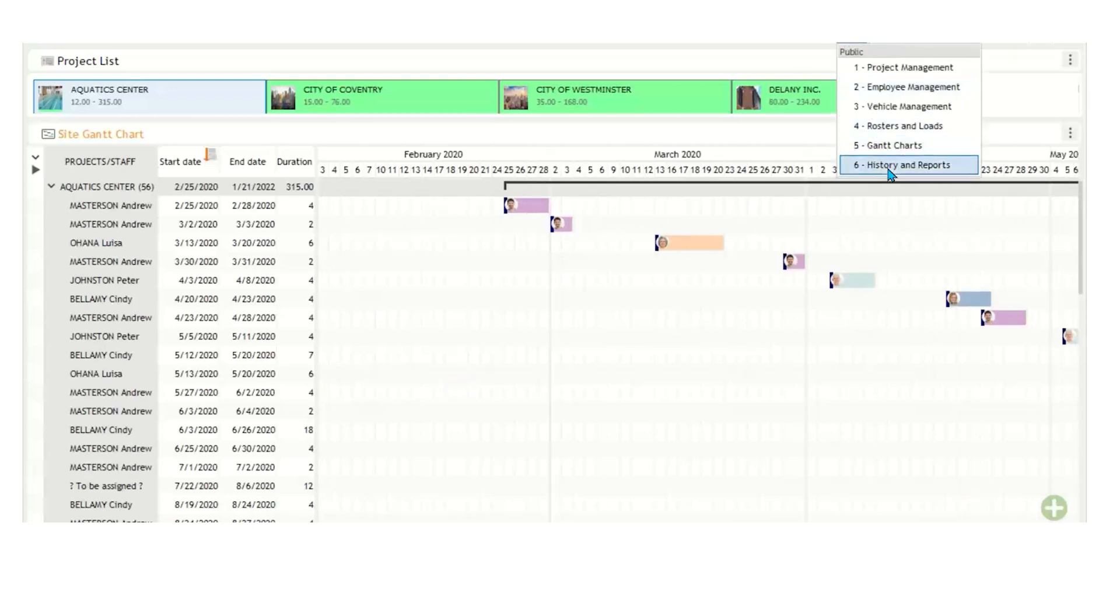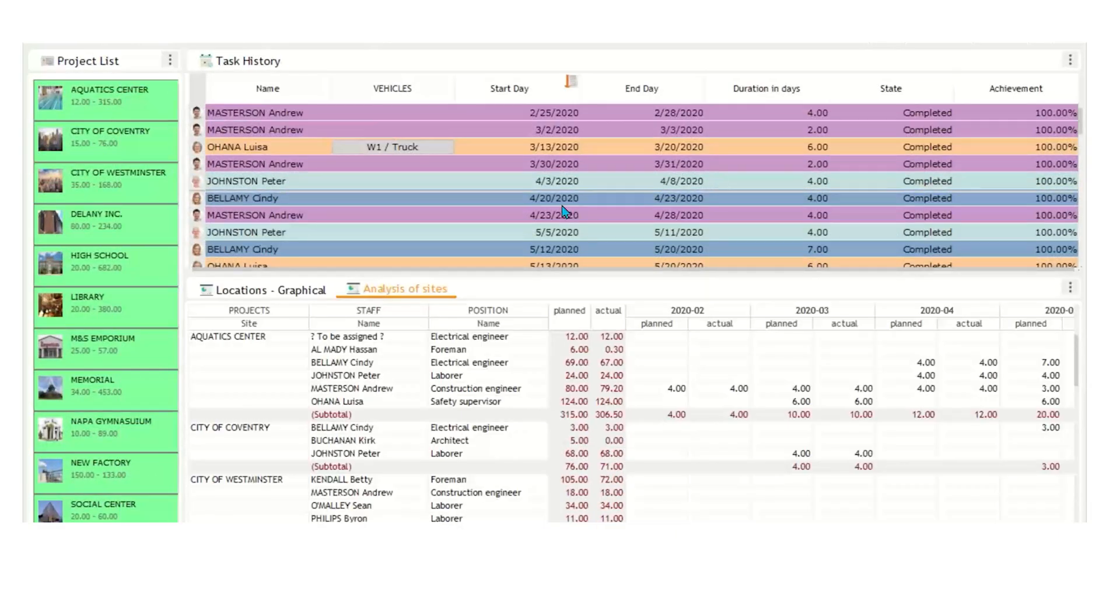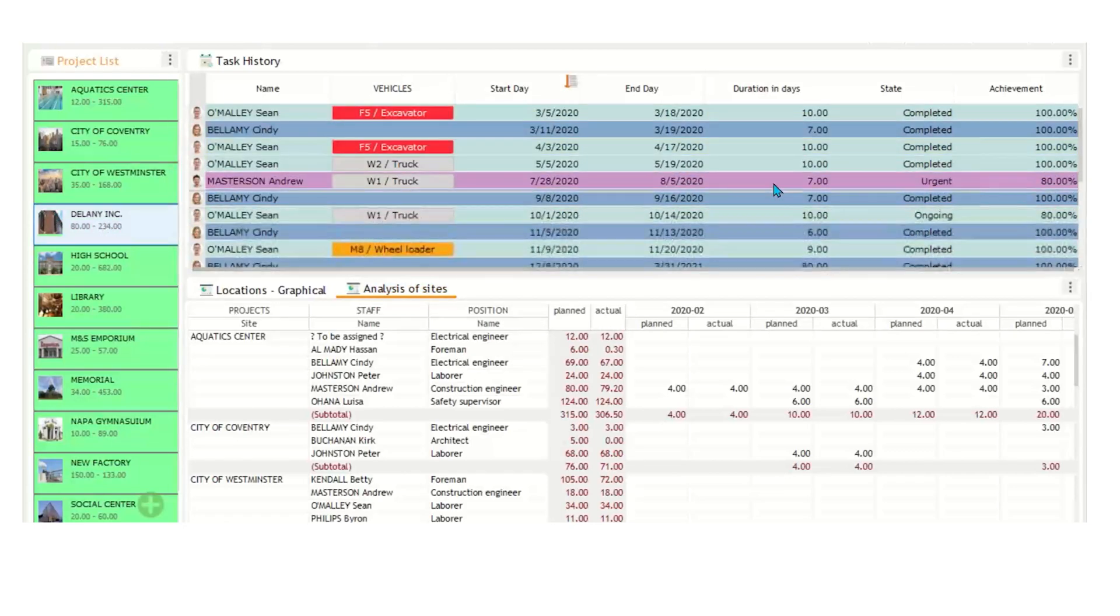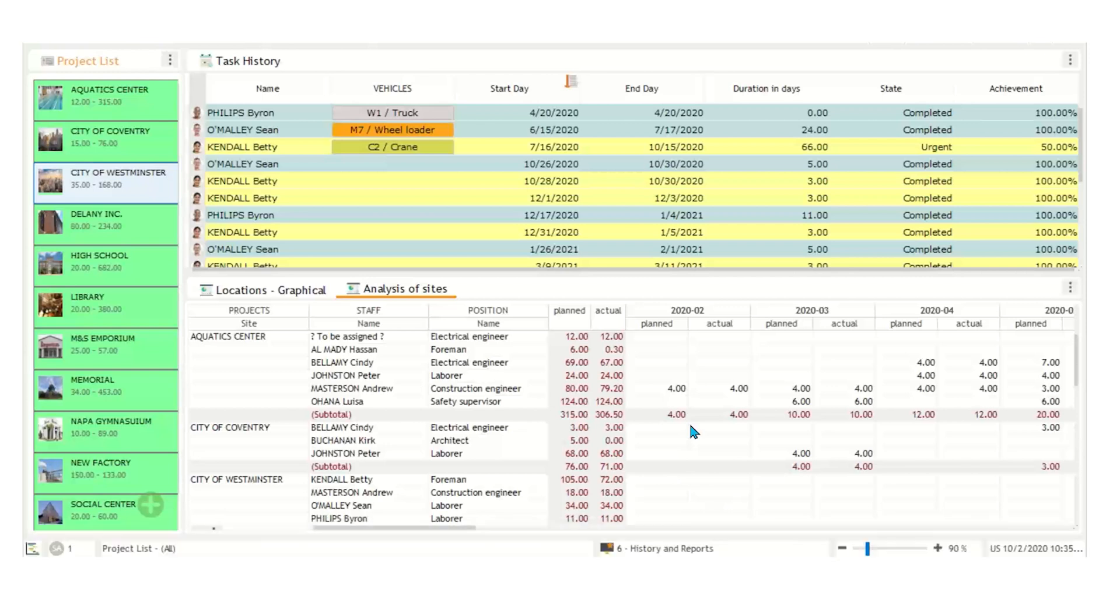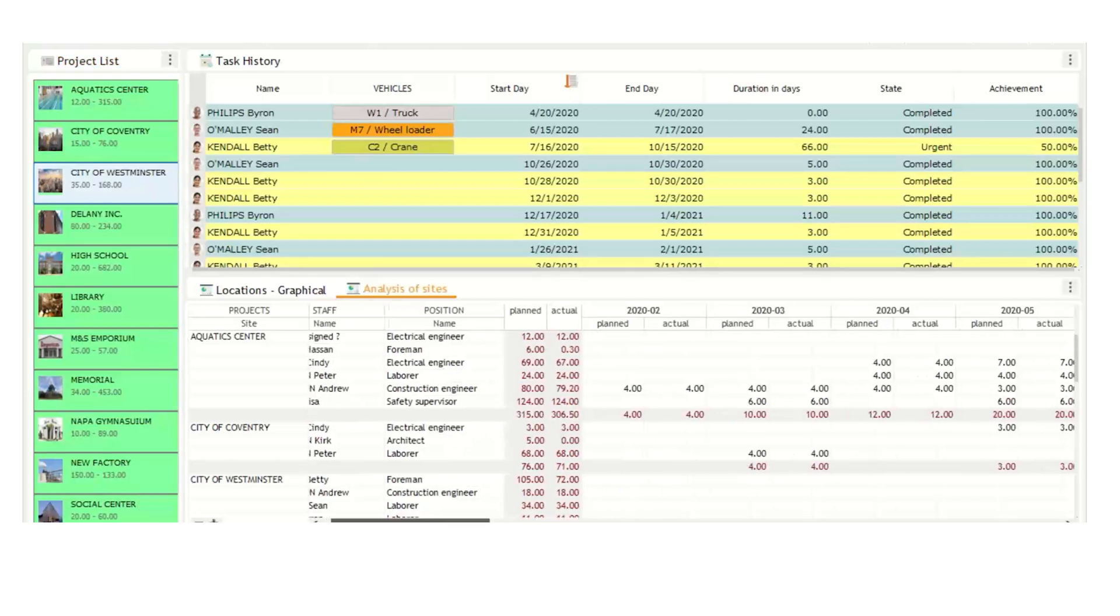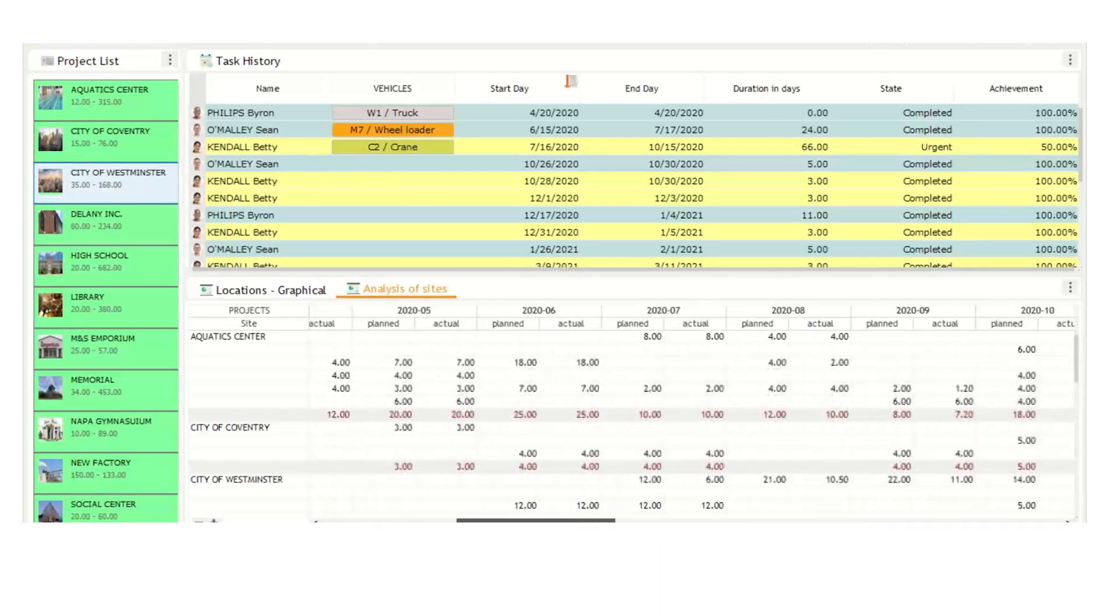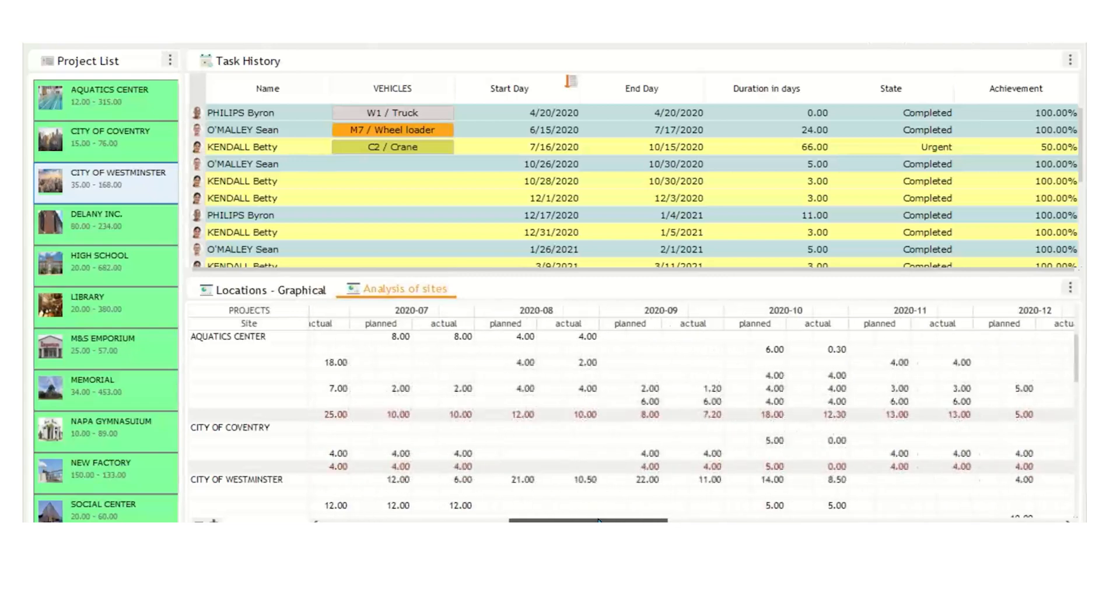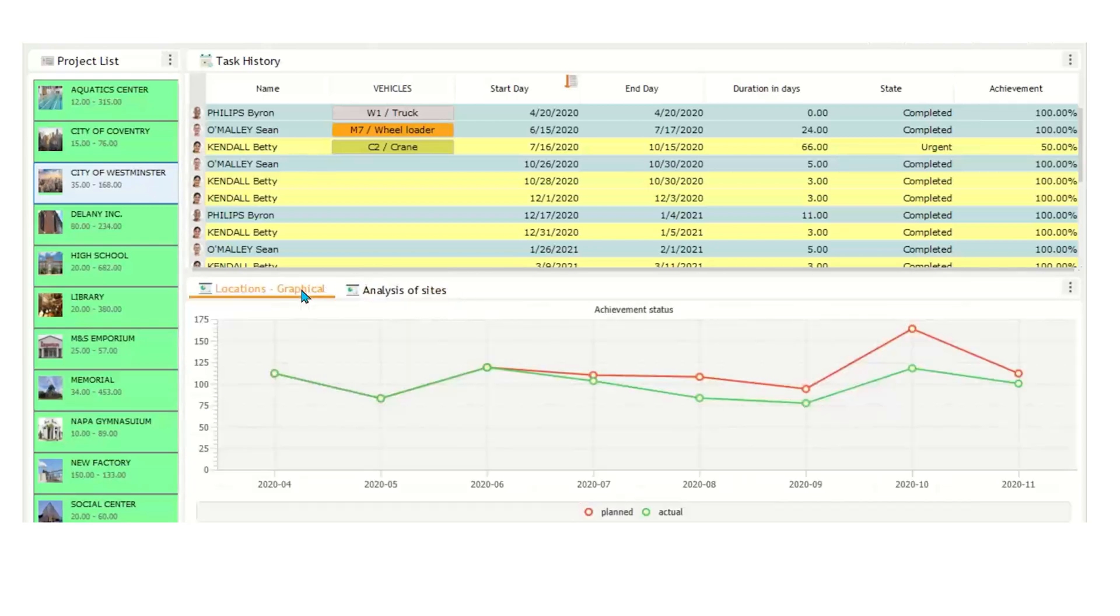Our last view called history reports. So here, we have a project list and task history associated with a particular project. So as I click through the projects, you'll see that the events change along with the information. On the bottom here, we have a report called analysis of sites, which was planned versus actual hours for every single site and with employee information here as well. So as we scroll across, it's broken down by month, and you could see if there are any discrepancies and if there are some employees that aren't getting the jobs on time. Under the locations graphical tab, just a line chart broken down by month, plan versus actual hours. This is just the tip of the iceberg. Visual planning can create any report in real time to help you run your business more efficiently.